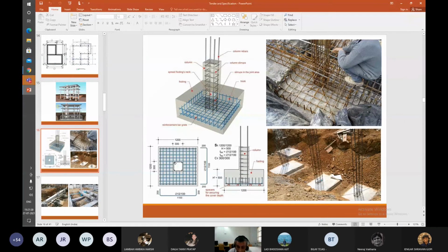There is constant water coming in, so there is going to be a constant dewatering process, all kinds of efforts for waterproofing, and a lot of shuttering involved. In that case, the rate for a raft will be different from the rate for a footing. But the process of calculating the area or the volume remains the same.